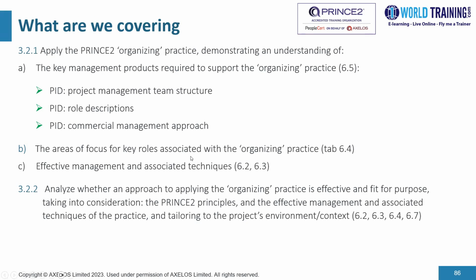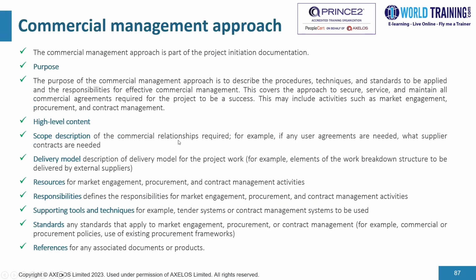environment or context. Now, one of the key documents that is relevant to this particular practice is the commercial management approach. Now, the commercial management approach document is a part of the PID document, which is one of the key documents we create as a part of the initiating a project process. Now, what is the purpose of this particular document? The purpose of the commercial management approach is to describe the procedures, the techniques, and standards to be applied, and the responsibilities for effective commercial management.